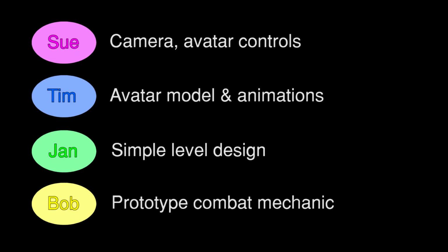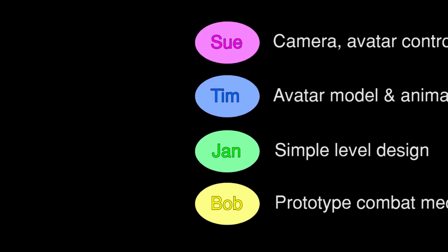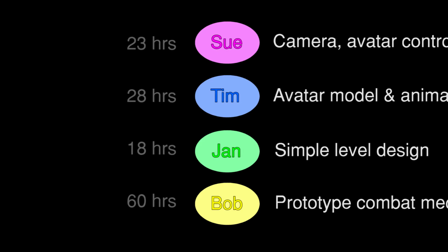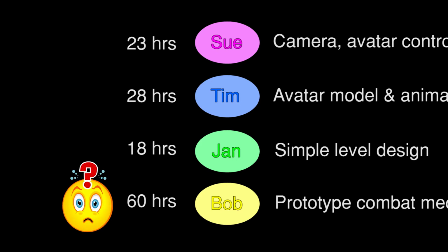Delegated work should also be given a rough time estimate, usually given by the team members who have to do the work on the task themselves. At first, this time estimate will be a little rough. You may find you severely under or overestimate how long tasks will take, especially when working with others. This is okay. The point of Scrum is to identify these misunderstandings and rectify them in future sprints. Just don't be that guy who estimates poorly, sometimes intentionally, every time. We will get to that in a bit.